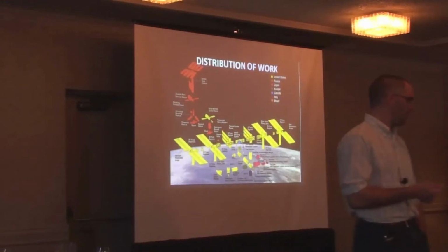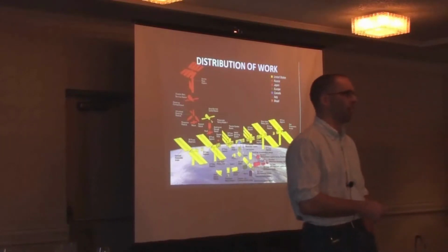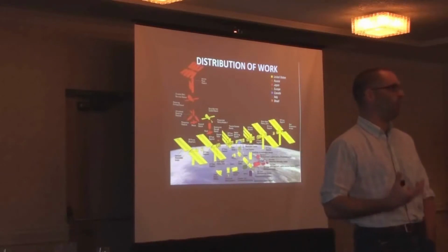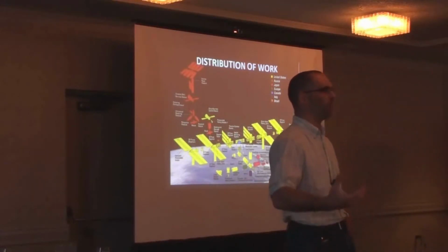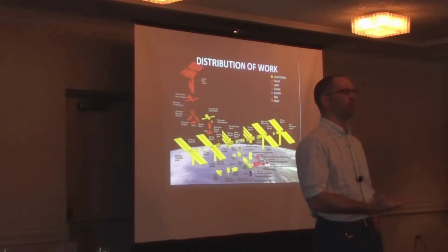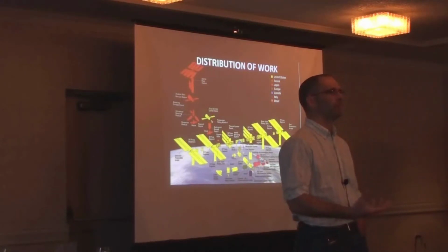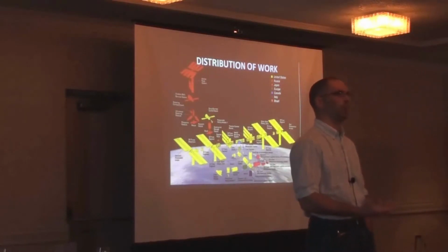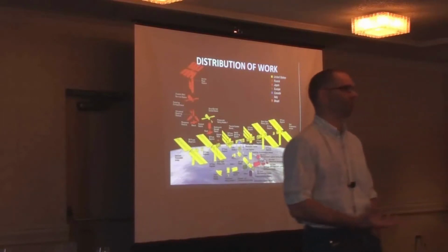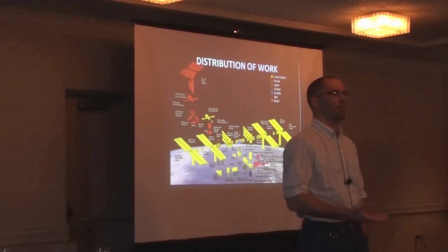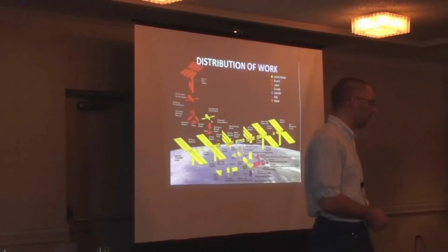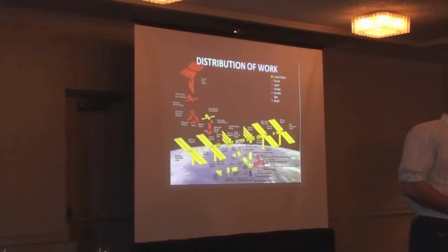So for instance, I spend a lot of time with our teams making sure that you don't end up with these silos of expertise forming by letting one particular group of people own one thing. This is the same as if you've heard people talk about the truck factor or the lottery factor. How many people on your team would it take to win the lottery and quit before you basically killed the project, because Fred was the only guy who understood the database schema and he just won the lottery and he's gone? So we're killing the project. It comes down to a lot of the same things.